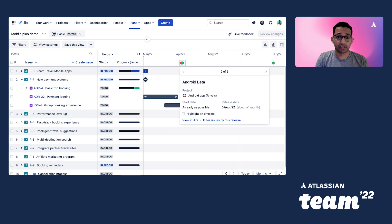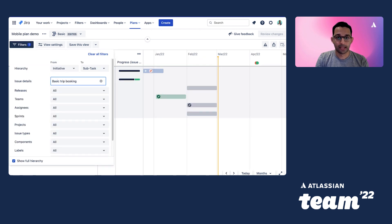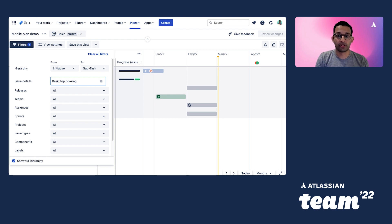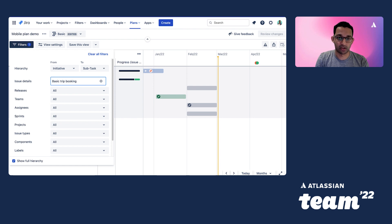There are many smarts to assist you with your planning. In this example, Advanced Roadmaps has identified that the expected completion date for ADR22 extends beyond our projected release date, so a red icon is shown. Advanced Roadmaps gives you the flexibility of easily moving between high-level views and drilling into the details. As a program leader, you might want to just see the epic level and above for the bird's eye view of your program, but you can also drill down to a single epic to get a deeper understanding of how things are going there.